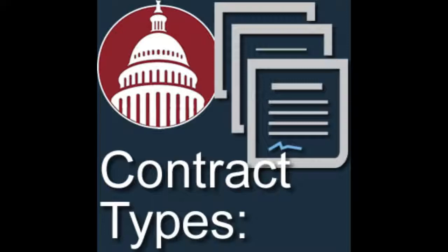If you have, let's just say, you host a Christmas party, and you get an open bar. And in that open bar, of course, there's alcohol. That alcohol is rolled up into your overall overhead of your company. That becomes a cost that becomes part of your cost pool. That cost pool then becomes part of this government contract. Alcohol is not allowable.